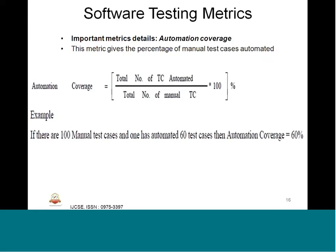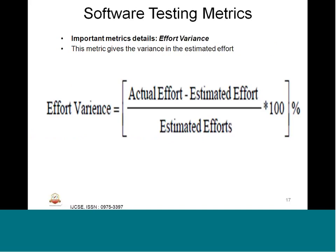Automation coverage is the percentage of manual test cases that have been automated. The formula is: total number of test cases automated divided by total manual test cases times 100. For example, if there are 100 manual test cases and 60 are automated, the automation coverage is 60%. Since testing cannot be 100% automated, there is always a mix of automation and manual testing. Effort variance is another important metric used by program management: actual effort minus estimated effort divided by estimated effort times 100.